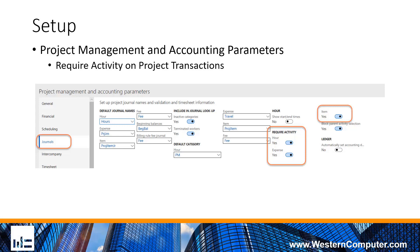We have in the system a number of different parameters that will allow us to require the activity on certain transactions. That basically means we're going to require that somebody put this project transaction against the WBS. A number of advantages in that is you're going to get all of the project transactions recorded against your WBS so that you can do both budgets and actuals against each task in the work breakdown structure.